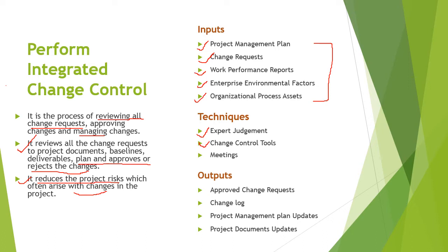The third is meetings. In this case, meetings are usually referred to as the change control meetings. Whenever needed for the project, a change control board is responsible for meeting and reviewing the change requests, and for approving, rejecting, or any other disposition of those changes.